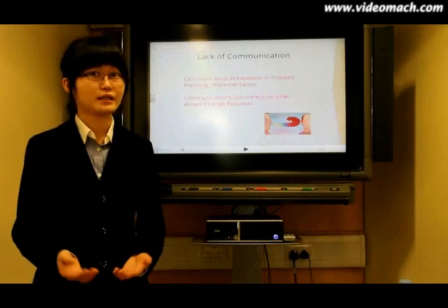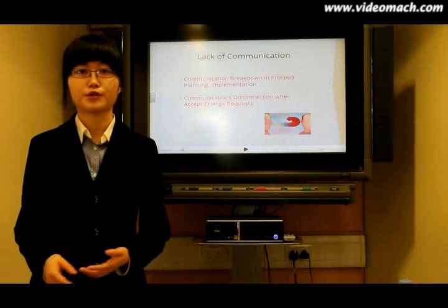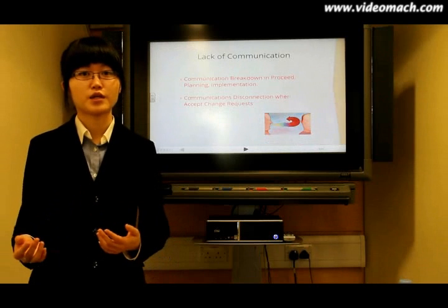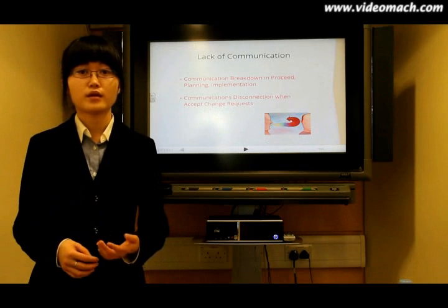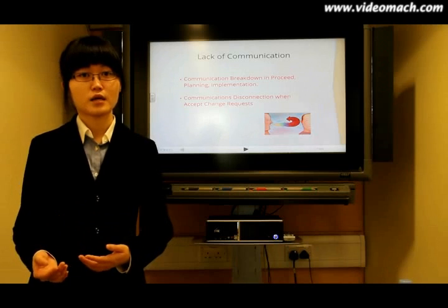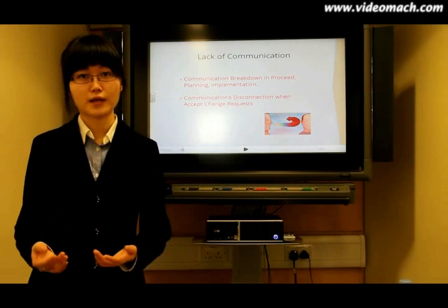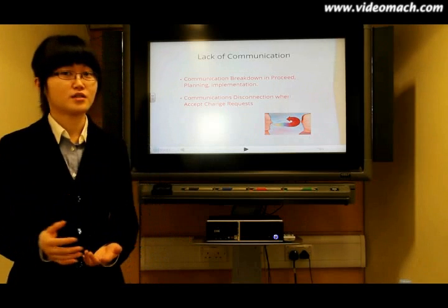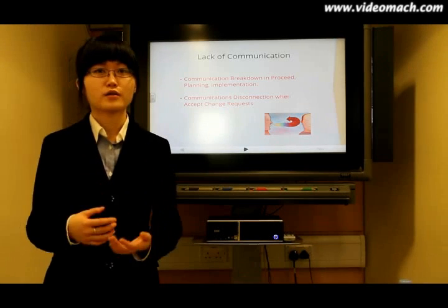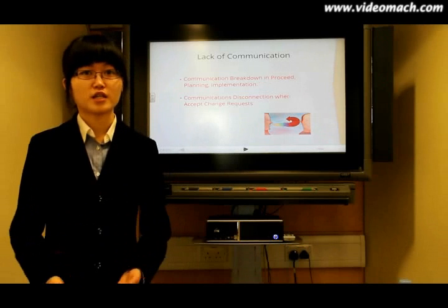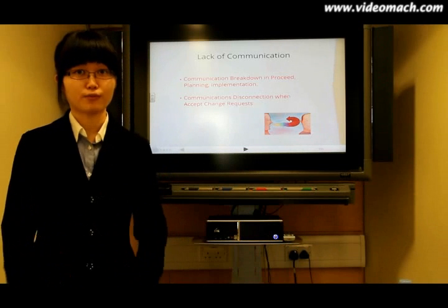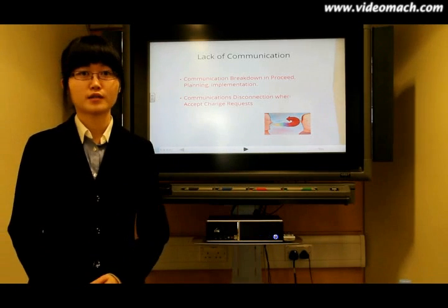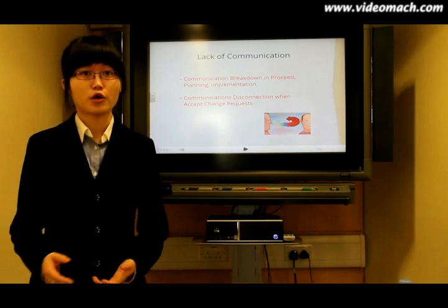Last but not least, there was little communication between the airport designer and management and the BAE designer. As a result, they planned and processed the project without understanding the complexity. They also did not understand how a change of one part of the system would impact the rest of the system. Many of the changes required a significant redesign of proportional work that had already completed. It may result in even more troubles.